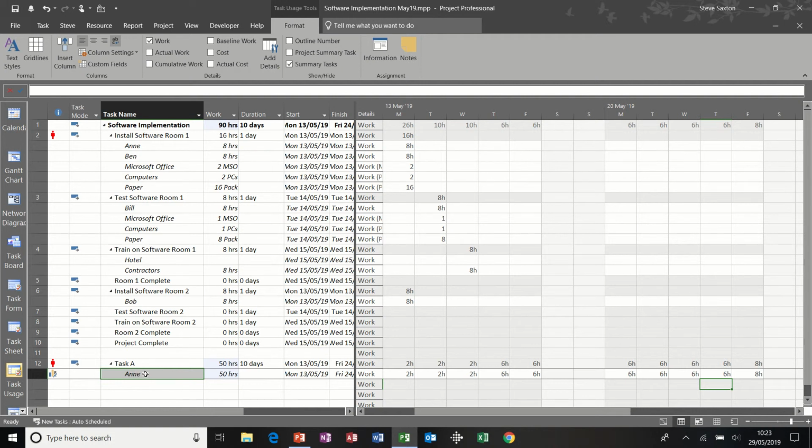So that if I was a project manager, she might not be working the full 8 hours a day on the project. So that reflects that, and that therefore you haven't increased the duration, and you've adjusted the work contour, and you get the little symbol in the information column there saying this work assignment has been edited. So that's task usage.